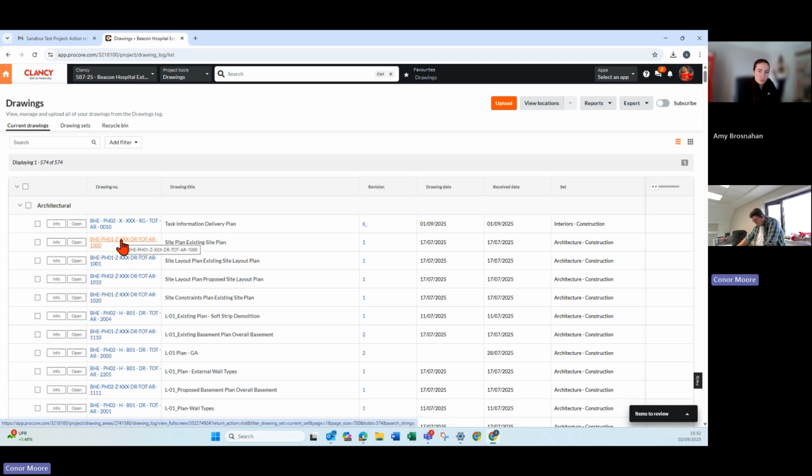Clancy's will be in charge of revision control. So when the design team are uploading a drawing, we double check, is this a drawing from before or is this a brand new drawing? If it's a drawing from before, we double check the revisions, and then we make that one the newest revision. That makes sense. So Brian has to... I think Brian normally gives permissions to...